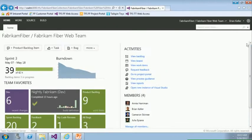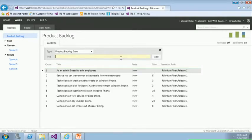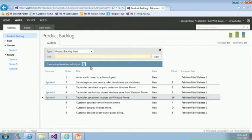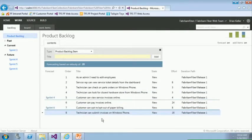The next thing I might do is come into this backlog and capture some new work that's coming in. As an admin, I need to edit employees — when I press enter, that just gets saved straight back to Team Foundation Server. I can also turn on forecast lines. Because we have effort estimates here, we also have a velocity we use to estimate how much work we can get done on a per-sprint basis. If I hire more people or buy more beer and pizza for the team, maybe they can get more done. I can communicate with my stakeholder and say, based on this prioritization and the amount of money you're giving me, this is when you can expect features to be done. As I drag items up and down the backlog, changes are made automatically in Team Foundation Server.